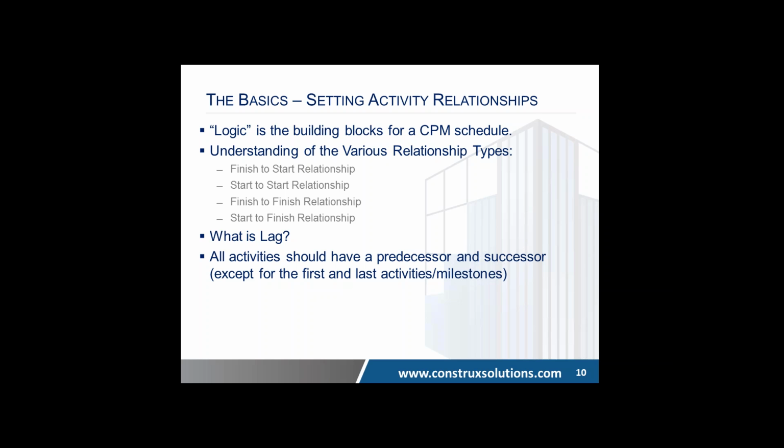Lag is essentially giving this relationship a little bit of room. For instance, lag on a start-to-start tie: a lag of 2 would say I do not start my painting until 2 days after I started my drywall.